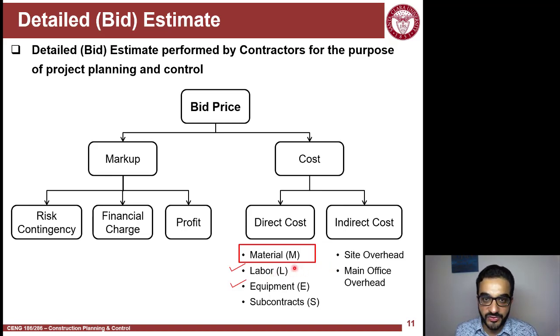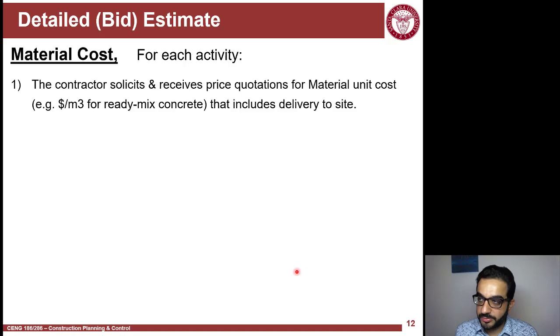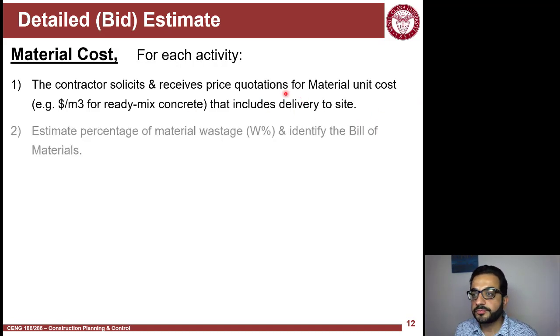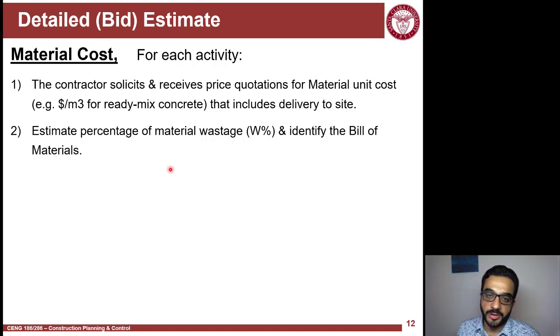Material cost is similar, so we'll see how to do that. If you're a contractor buying material directly, instead of your subs doing that, then you need to solicit material prices and buy them through purchase orders. You can get the numbers directly from suppliers, but you can also get them from RSMeans. It's better to get the prices from suppliers, but for our course here, we're using RSMeans.